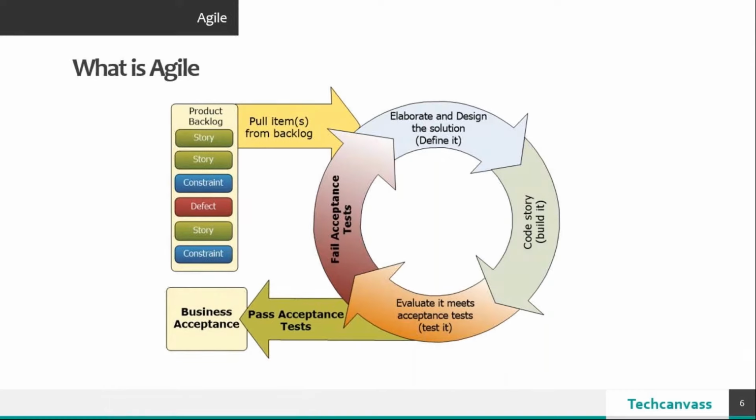So you test based on those acceptance criteria. And basically, acceptance criteria is nothing but a list of checklists to ensure that you are building the right requirement, or this is what it is that needs to be built. And finally, if it has passed, at the end of the sprint you have a demo or a sprint review wherein you demonstrate the story to your product owner and your stakeholders.